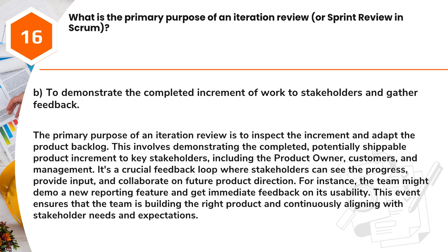Answer: B. To demonstrate the completed increment of work to stakeholders and gather feedback. The primary purpose of an iteration review is to inspect the increment and adapt the product backlog. This involves demonstrating the completed, potentially shippable product increment to key stakeholders, including the product owner, customers, and management. It's a crucial feedback loop where stakeholders can see the progress, provide input, and collaborate on future product direction.